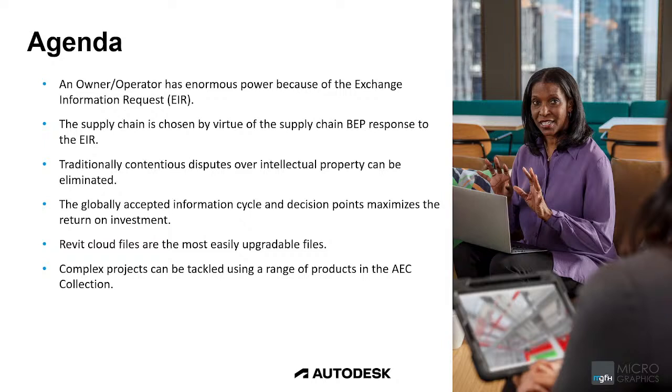are we going to use the original consultant? So that's not guaranteed. Although we have their file, we have possession of the intellectual property, we might appoint somebody else to work on that project. And again, in that case, that's where the lawyers would have to become involved, and some ground rules will have to be structured to say these files are provided with the understanding that in the future the project might be worked on. We might not be the party that works on that file, and we give permission to whoever is going to carry on with that project at that time to use the original authored file.